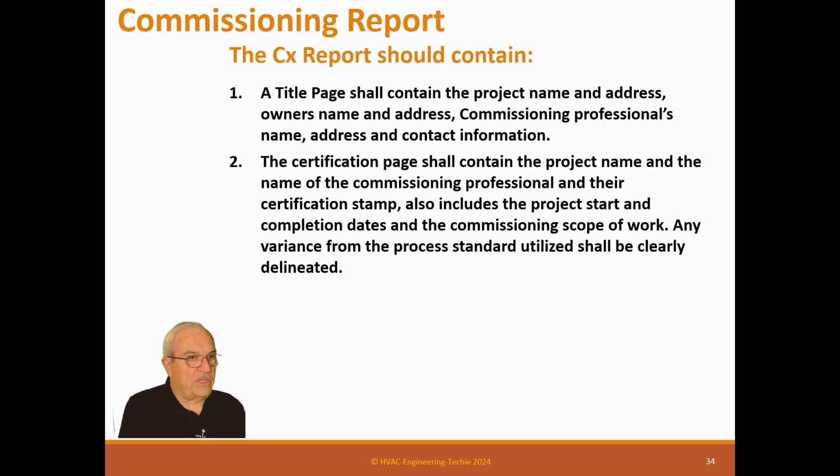Okay, so what we're saying here, the certification page is the one where you're certifying that I commissioned this project and this report accurately reflects that commissioning effort. Now, some of the certified people have a stamp, and it's a commissioning certification stamp. Others have just a PE stamp, and can use that. But anyway, this page is a certification page. If you have no stamp, you still need the page.